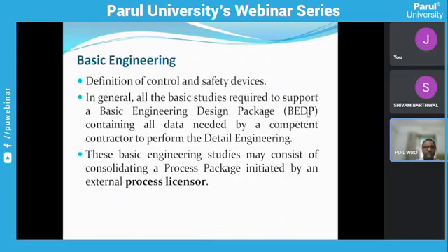So once the basic engineering is done, at that time, there are some specialized fields. In that case, you have to recruit the process licensor, because there are some particular packages where the process know-how is only available from the process licensor. So the process licensor will provide the necessary data and documents, and based on that, the basic engineering design package, BEDP, is prepared. And that is part of the tender document.